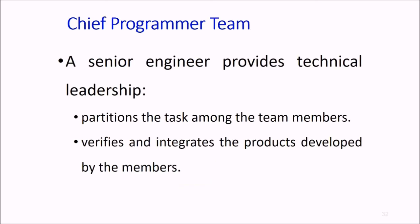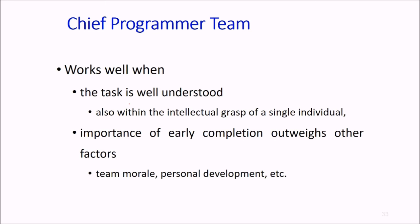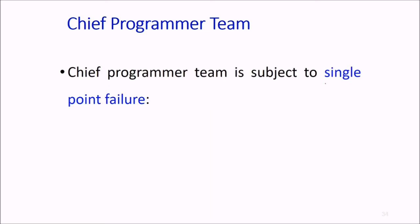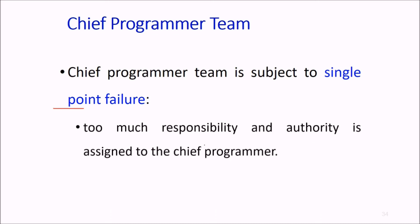When it comes to chief programmer team, there will be a senior engineer who provides technical leadership. He partitions the work or task among team members and verifies and integrates the products developed by members. This team works well when understanding of the task is good and within the intellectual grasp of a single individual. It also has a peculiar property that importance of early completion outweighs other factors like team morale, personal development. This chief programmer team is subject to single point failure because too much responsibility and authority is assigned to the chief programmer.